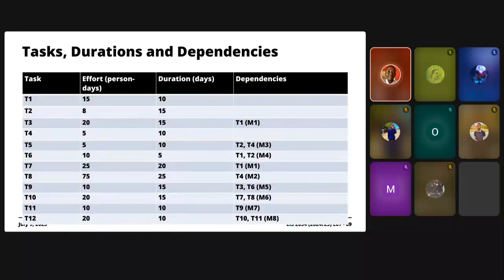The simple answer is that effort does not really take into account things like holidays. You're saying for us to work on task 9, we will need exactly 10 days. But in a place like Zambia, if that 10 days spans weekends, you won't count Saturdays and Sundays. So as a result, you have a situation where the effort is less than the duration.